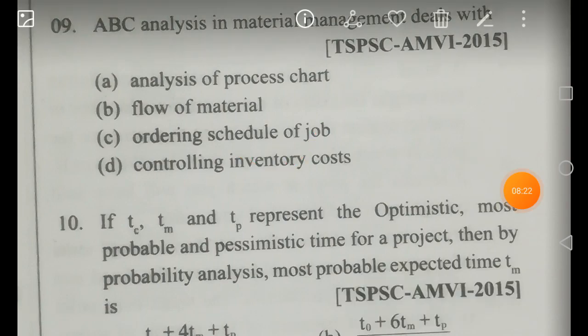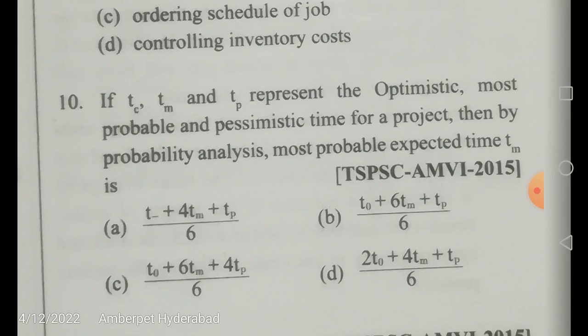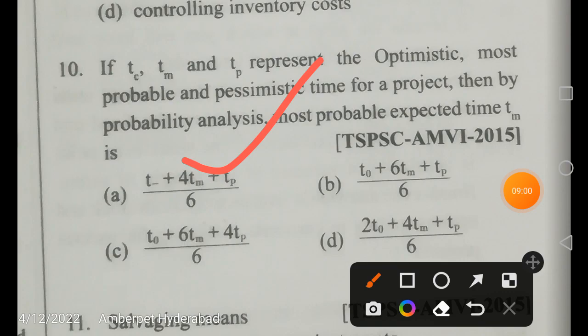In PERT, three time estimates are used: t_o (optimistic time), t_m (most probable time), and t_p (pessimistic time). The expected time is calculated as: t_e = (t_o + 4·t_m + t_p) / 6.